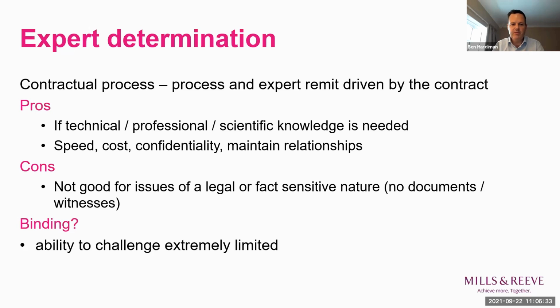But where issues have come before the courts, generally judges have taken the view that an expert's decision is binding and shouldn't be interfered with, because someone with appropriate knowledge and expertise who's been appointed by agreement of the parties has reached a reasoned view. So in reality, the ability to challenge is very limited. The right to appeal is virtually non-existent. If you don't like the outcome, the reality is you're pretty much stuck with it. And finally, Ben, just when you've got the determiner's decision, how then do you enforce it?